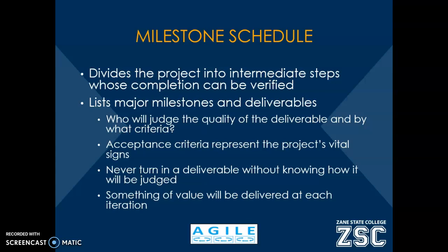A milestone schedule is not a very detailed schedule. It's not going to tell us on what day which activities are going to be conducted, but it is essentially going to give us some goals, some deadlines about when different parts of the project will be completed. And so this is important to know going into a project. People who are going to be involved in the project need to know what kind of time commitment they're signing up for. And the customer wants to know how soon they'll realize the benefits of the project. So the milestone schedule provides that information.